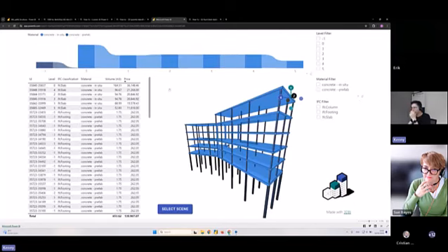And then we link this dashboard with, again, a very simple Excel file that contains unit prices. For example, this concrete in situ has this unit price. And then of course, if you combine both and create a calculated column, you suddenly have a price for a specific element.